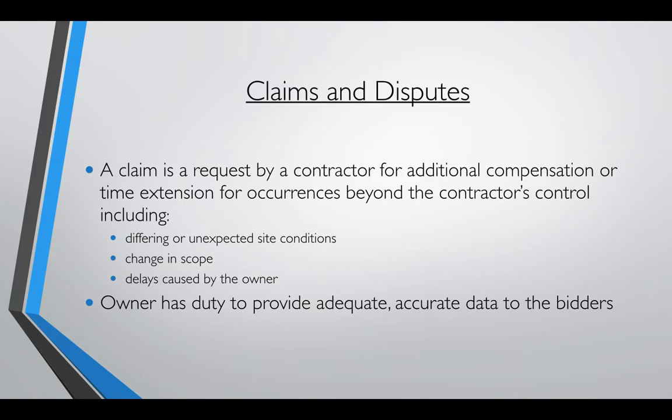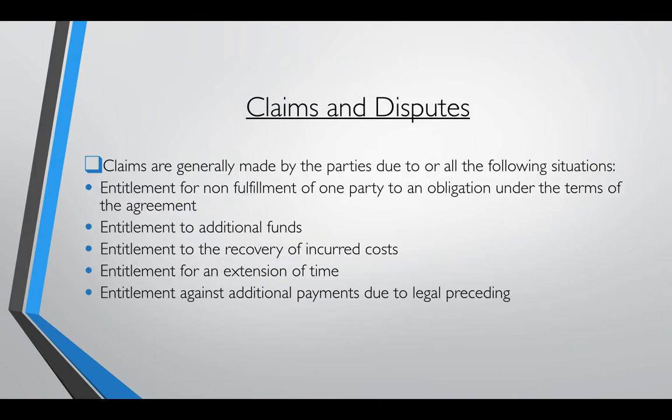Delays caused by the owner as well can become a claim. So the owner has a duty to provide adequate, accurate data to the bidders. The claims are generally made by the parties due to one or all of the following situations. They can come after you for entitlement for fulfillment of one party to an obligation under the terms of the agreement, entitlement to additional funds, entitlement to recovery of incurred costs, entitlement for extension of time, and entitlement against additional payments due to legal proceedings.